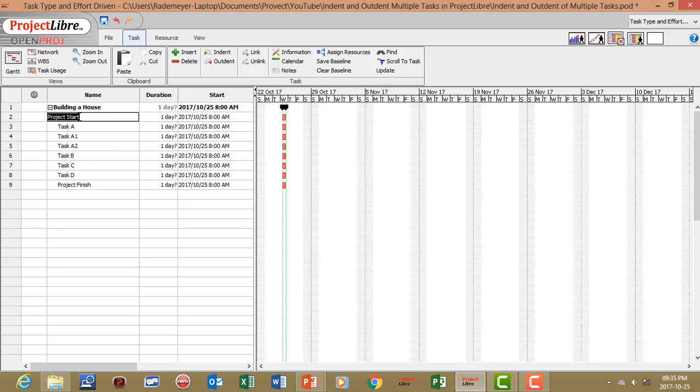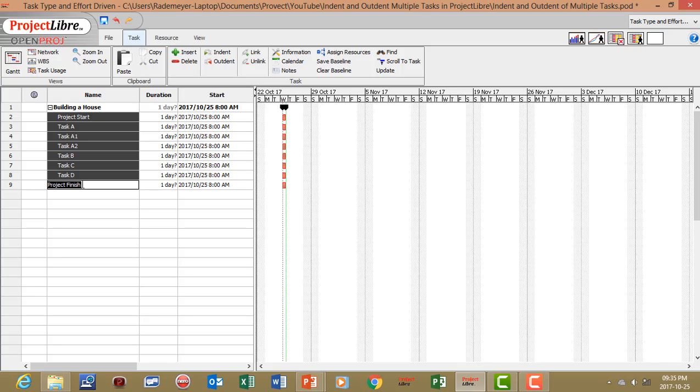Let's click on project start, press shift on the keyboard, click on project finish and say outdent.